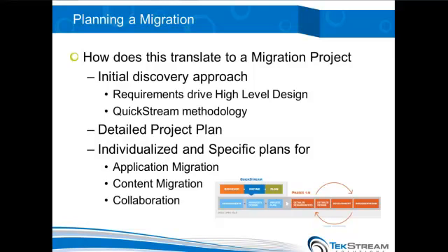Okay, so that initial discovery approach, that discover, define, plan, drives the high-level design. That is something that I generally recommend, and we recommend, that you do upfront and almost as its own separate thing. It's a lead into whatever else you want to do, regardless of whether you prefer something that's a little bit more agile, where you're just doing it as you go, or something that is more of a true waterfall. You still need to know upfront what it is you're doing.